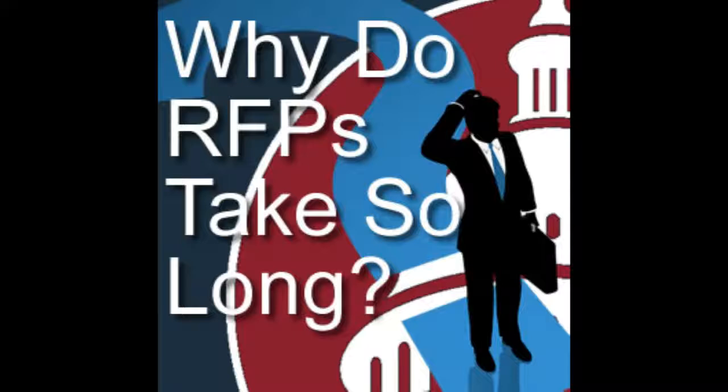Right. So we touched on that. The number of approvers is also lots of times linked to who you're buying it for. Let's use the Army for example. If you're just buying products for your base, there's probably not a lot of approvers in the process. If you're buying something for a command, you might get a few more people involved.